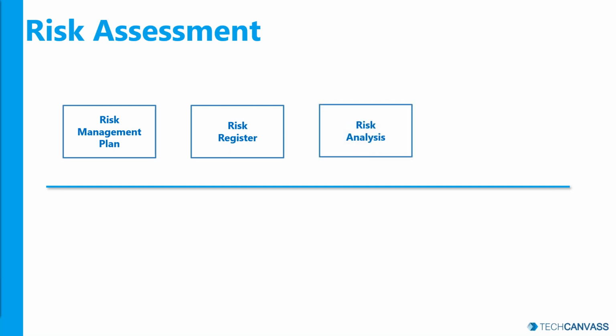By doing risk analysis. And as I mentioned earlier, every risk comes with a cost, and that cost is typically assigned against something called contingency reserve. If a risk that I identified has a potential impact of, let's say, $10,000 on the project, that $10,000 will be part of contingency reserve when you are estimating for the project. So you need to identify that impact as well during the project planning stage.